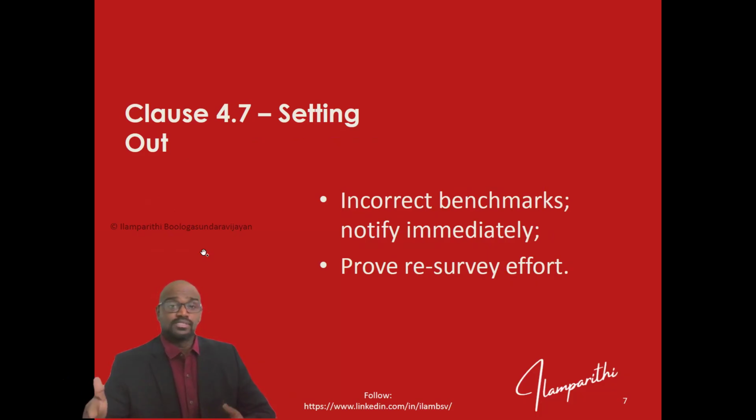So if there are any mistakes in these benchmarks, it will have an impact on the complete project. For example, if there are survey reports and the survey reports have not been properly classified or categorized, or there is a major flaw in that, the contractor has to prove the requirement of a resurvey and the time and cost spent on the resurvey as per this class.